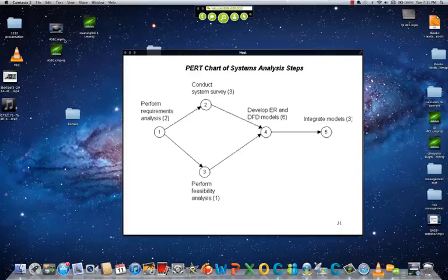1, 2, 4, 5, right? Since 2 plus 3, 5 plus 6 and 3 give you 14, right? If you take the other path, 1, 3, 4, 5, this would be what? 12, right? It's 2, 1, 3, 9, 12. Good. So again, question to you.